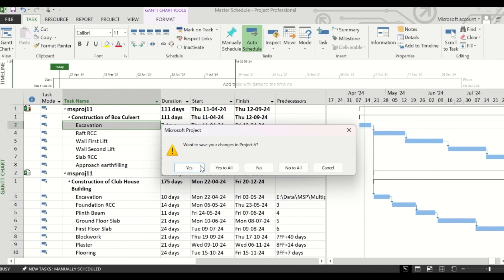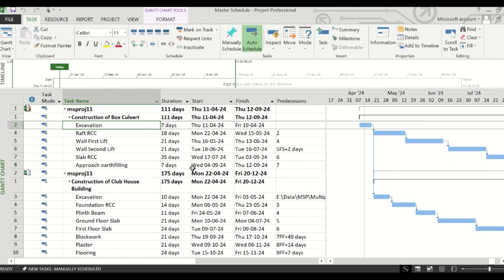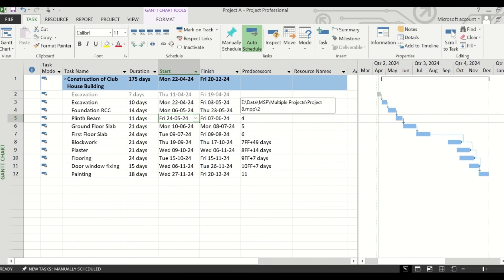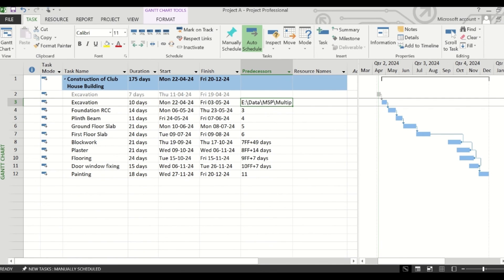And if you save this, there will be a dialog box asking if you want to save your changes to Project A as well. If you click on Yes, the changes will be saved to the sub-project files also. Now if you close this, you will see that the link has been created in the original file also. This is a very useful technique for linking two projects if you are having shared resources.